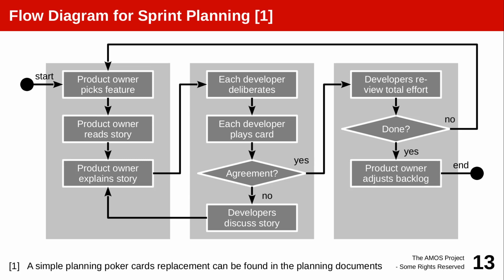And if it was a physical meeting, they would hold this classic card deck with numbers, and then they all would think, oh, it's a 3 or a 5 by themselves, and then upon command lay it on the table. So a key of this so-called Delphi expert method is that you don't see what the others are doing and calibrate or adjust to that. You think by yourself, and you all play the cards at once, so that there's no influencing each other and the cards are on the table.